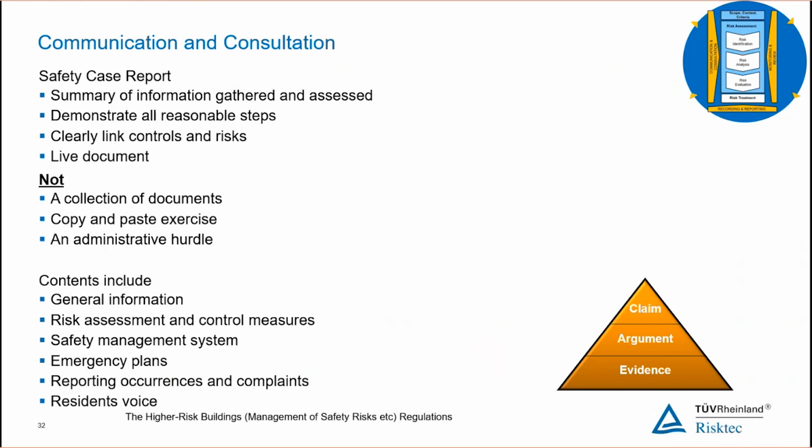The better we do this, the better we communicate this. The better we communicate it, the better everybody understands. The better everybody understands, the sooner we find the holes; the sooner we find the holes, the sooner we fix the holes. The sooner we fix the holes, the safer everybody is going to be at that point. What we're basically trying to do within the safety case is this concept of claim, argument, and evidence. We're safe. This is why. Here's the proof. That's what we're trying to do with all of this.